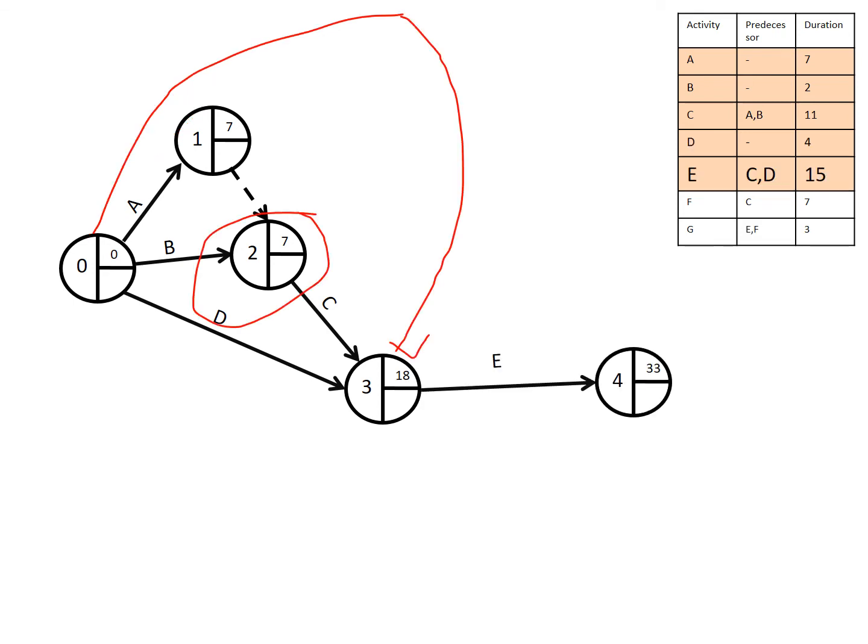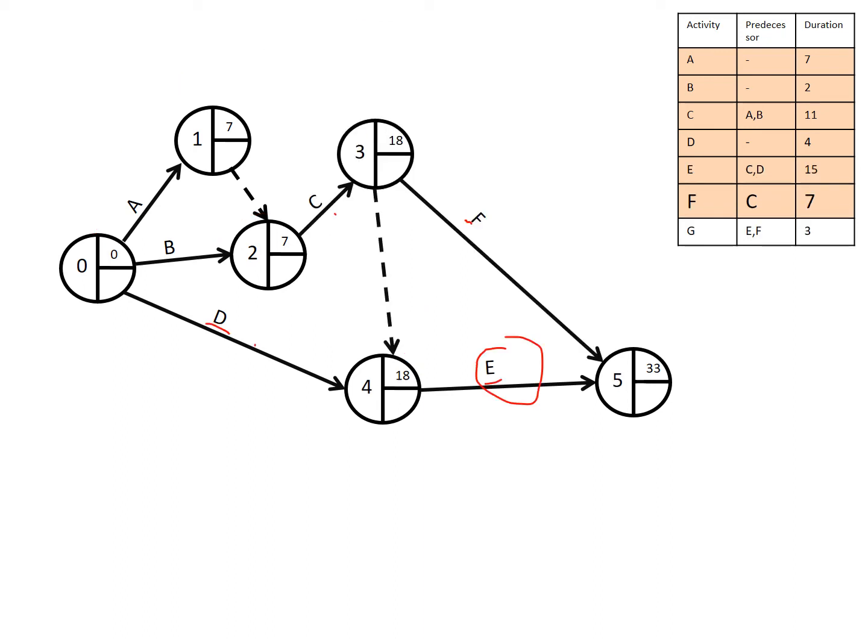So when you have activity E as per my arrangement, it becomes a bit easy, because if I was to have the other one on top there, you can imagine it coming all the way down, meaning that we can no longer have any other activity coming from these other events, which we'll see later on. So when you come to F, something interesting happens. F starts at C and terminates at the event which will cause G, which means that it will terminate at this particular event. Also E starts at C and D and terminates at this particular event.